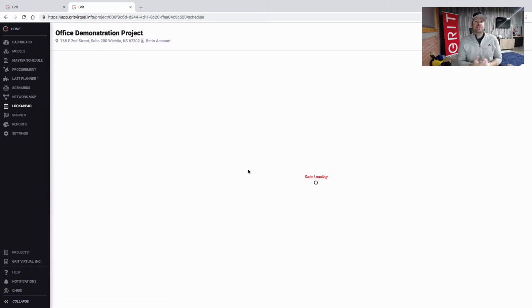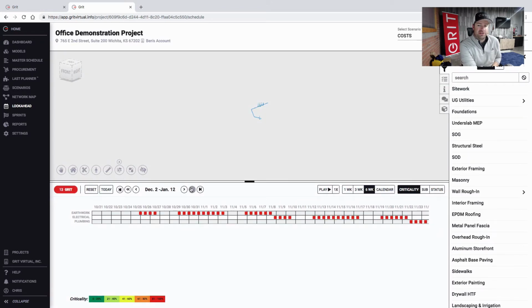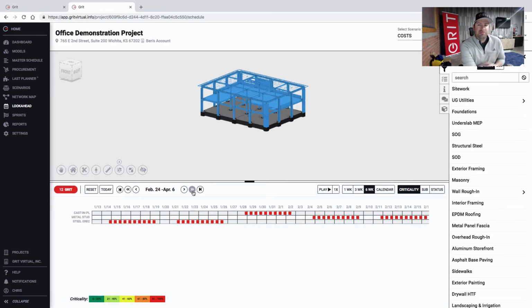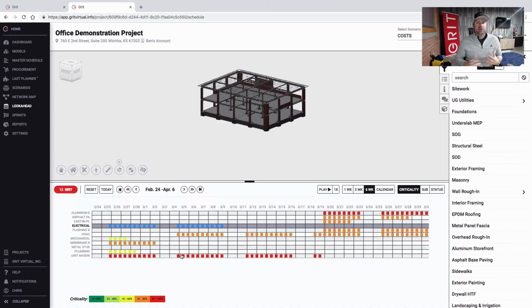Now at the simulation stage, we're going to perform CPM, but also look at things such as simulations. Our simulations are going to look at the constraints of work days, working hours, and the available crew size for each individual trade, but effectively reapply all the constraints onto the network map and constrain it back into swim lanes for each individual contractor. So now on the look ahead, you can drill down to just what you as an electrical contractor care about and see the impact of that, rather than searching through hundreds of lines on a Gantt chart to find the few that pertain to you.